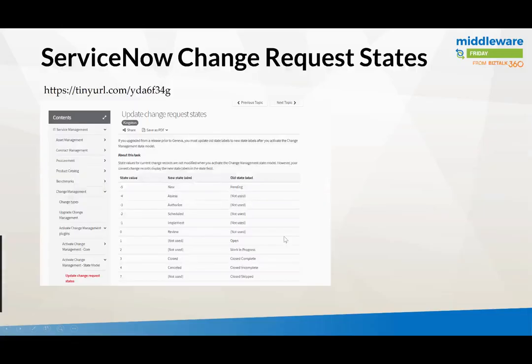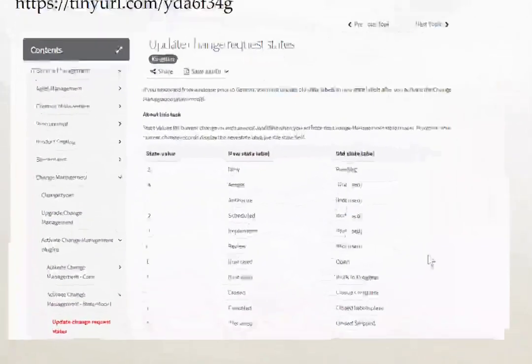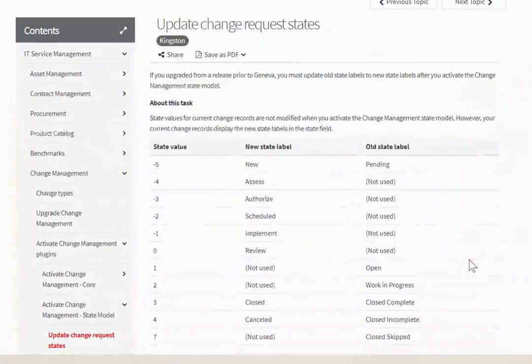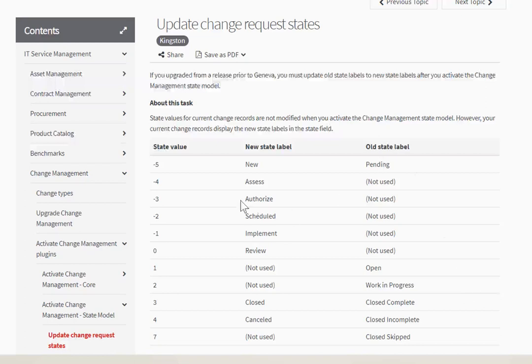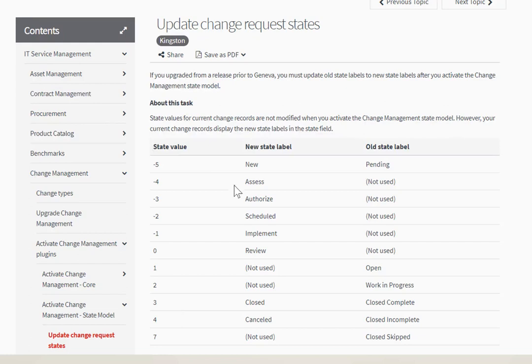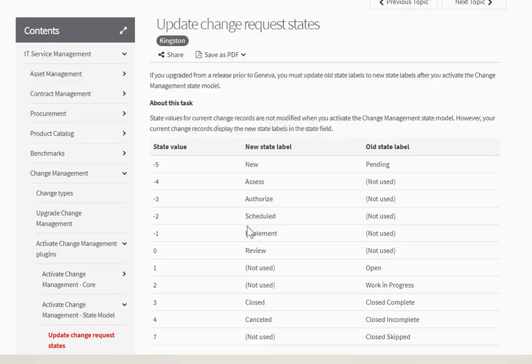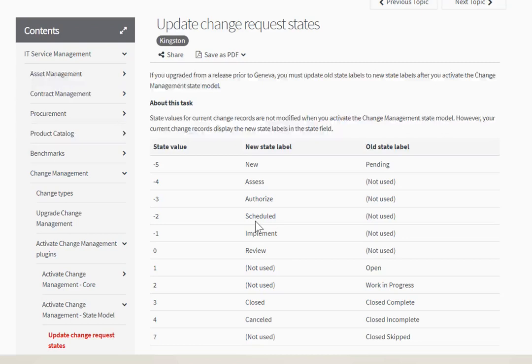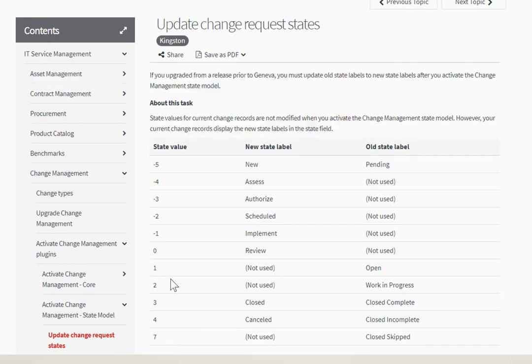Previously I mentioned that state of negative two. In the listing, these are all of the various states for a specific change request. I was interested in change requests that had been approved, which could be approved by the manager or approved by the change board themselves, and that was in a scheduled state. We're ready to go, the work is planned and approved, and we're just waiting on our start time to begin that work. If you wanted to key off of different states, you'd just change those values.